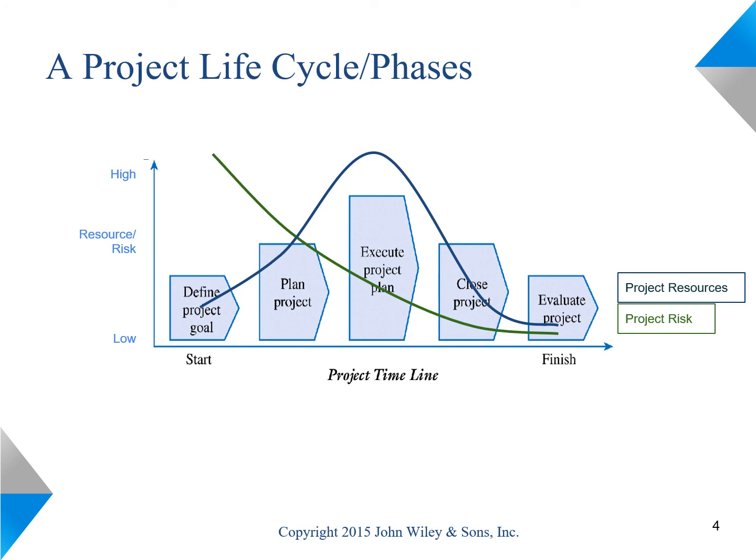On the other hand, the cost of any changes that we make to the project progressively gets more and more costly because changes create rework of some of the efforts done to that point. That is the reason to make sure that issues are addressed during the planning phase when the costs of changes are minimal.